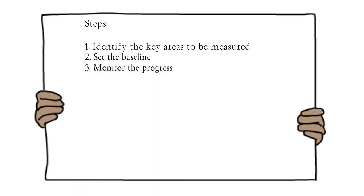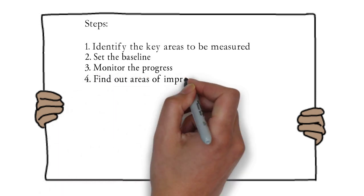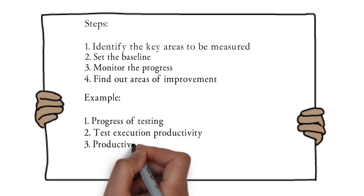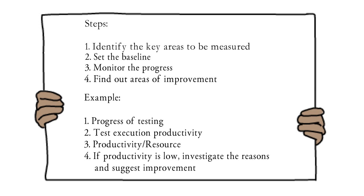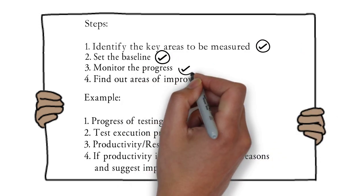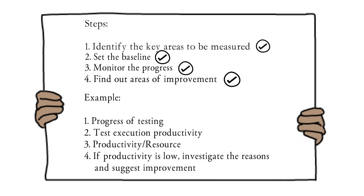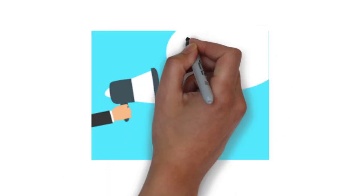The third step is to monitor the progress. The project manager or project lead should find out the productivity per resource. If productivity is low, we need to find the reasons. The fourth step is to find out areas of improvement. For example, if low productivity is due to lack of knowledge, a knowledge transfer plan can be facilitated to improve test execution.